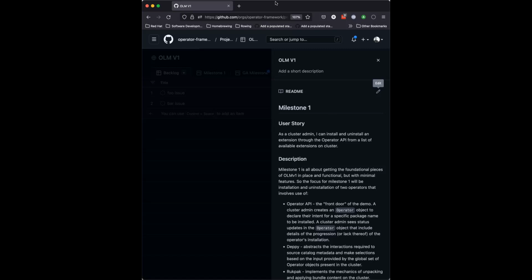But maybe another thing to say here is that I don't think anyone is under any impression that every milestone is going to touch every single component that we're working on. In my opinion, what we should try to do is have these milestones be as small as possible. Some of them might only touch one component at a time. And if we can do 3 milestones in 3 weeks, that's great. Now we've got 3 different places to collect feedback about. So the more targeted we can make these user stories for the milestones, the better. It just keeps us moving and keeps us getting feedback as quickly as we can.